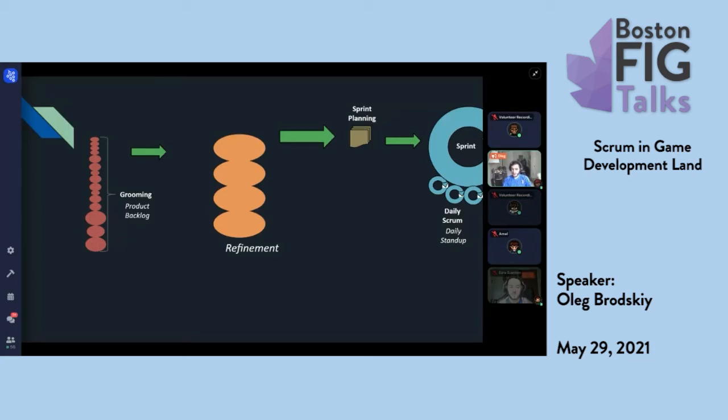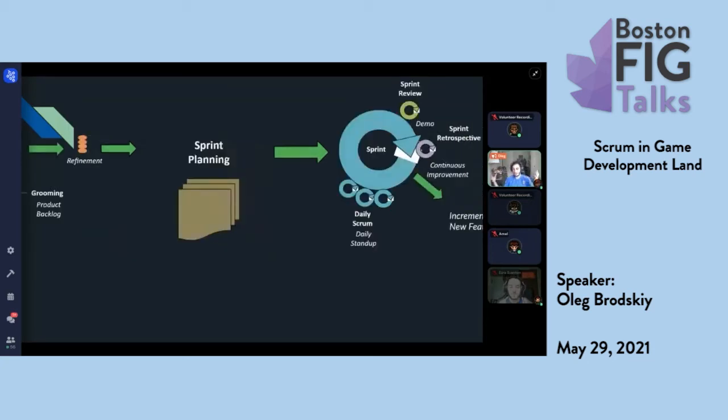So then once the tickets are refined, we can take them into sprint planning. So sprint planning for me is always pretty simple and straightforward. In Scrum, everything is a volunteer effort. I don't go and tell people what to do. The product owner doesn't go in and tell people what to do. We ask people to look at the work at the top of the list and say, okay, this is the most important thing. Who can do this work? And if anyone can do it, they have the opportunity to volunteer. If someone specifically wants to do it, they can, of course, volunteer themselves.